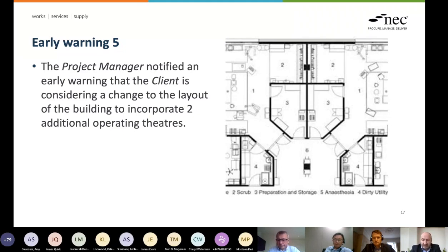And then I can get a quotation from you in terms of the potential cost, and we can get that on the table, Mark, to give you some idea as soon as possible on that. Obviously, the contractual timescale for that is 3 weeks to provide a quotation if I instruct one. Matthew, do you need that long? Can you do better? We could do one quicker than that, Ian, since you asked so nicely.